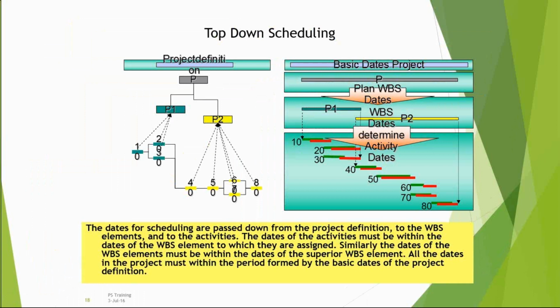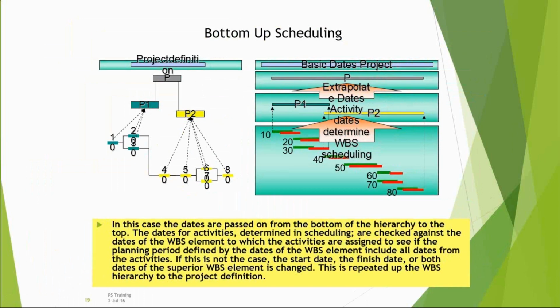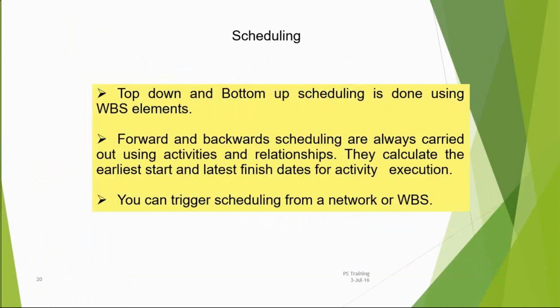Generally, we almost go with bottom-up scheduling only. Top-down is very rare; whenever we have a very constrained case, then we go with top-down scheduling. If that is the case, we need to ensure that the activities are completed within the constrained date entered at the WBS level. Yes. Even the system makes sure that you will be finishing the task within the stipulated time.